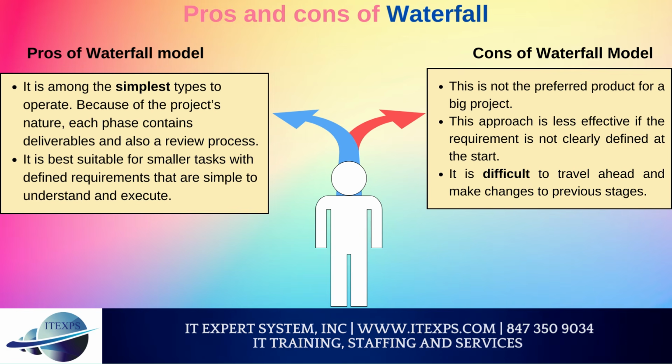Cons of Waterfall model. This is not the preferred product for a big project. This approach is less effective if the requirement is not clearly defined at the start. It is difficult to travel ahead and make changes to previous stages. The testing step starts after the design phase is finished. As a result, there is a high probability that flaws will be found during the development process when they will be more costly to repair.